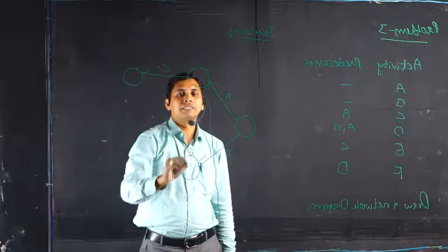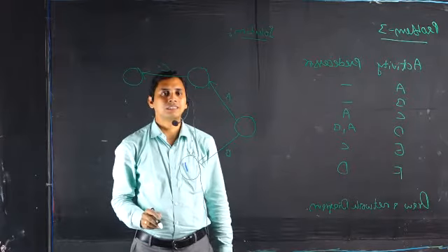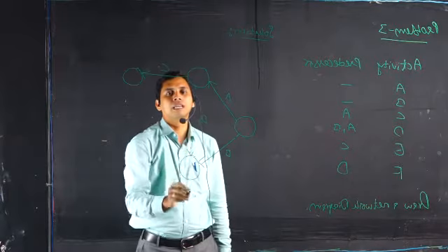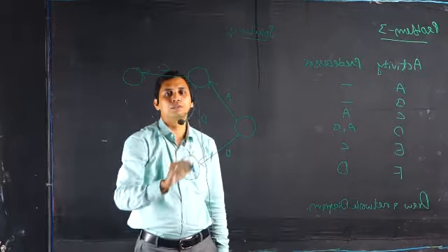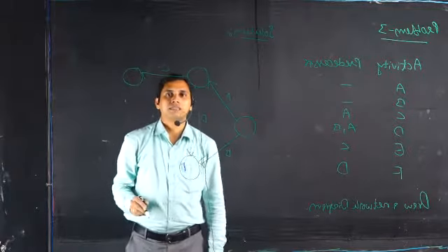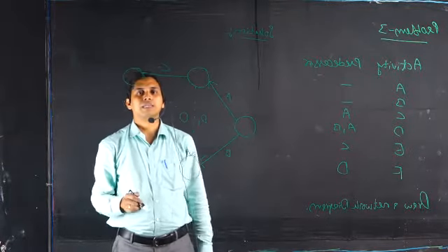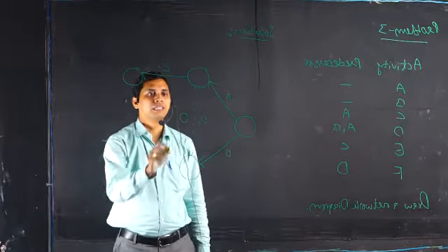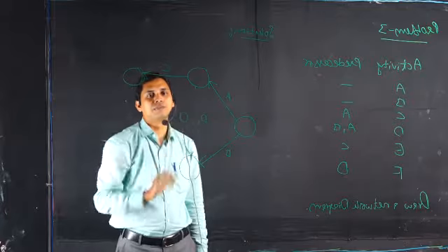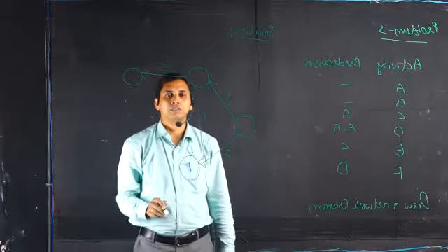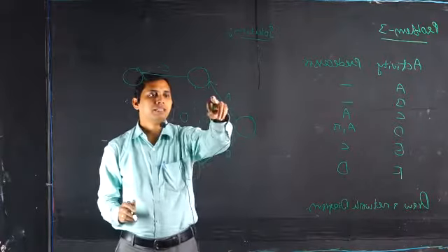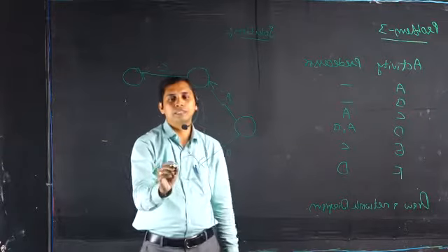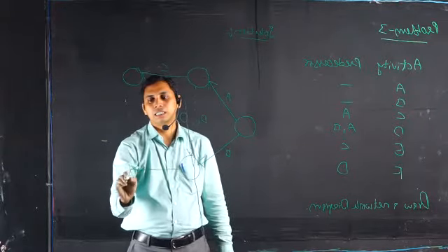A dummy activity is an activity whose duration is 0. So we indicate the dummy activity as D1, with a duration of 0. Technically we may not join A and B fundamentally, but we can join them with the help of a dummy activity, D1, with 0 duration. Now you can see we have joined A and B to write D. So now let's write D.